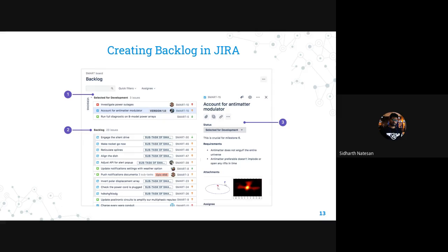For example, if I'm going to take an authentication module, the goal is going to be like, as a user, I should be able to successfully log in to the website. That includes forgot password, login, sign up, and OTP verification. All these points have to be included in the sprint goal, and we have to achieve that so that the product can be potentially shippable. The user can start using the authentication module.